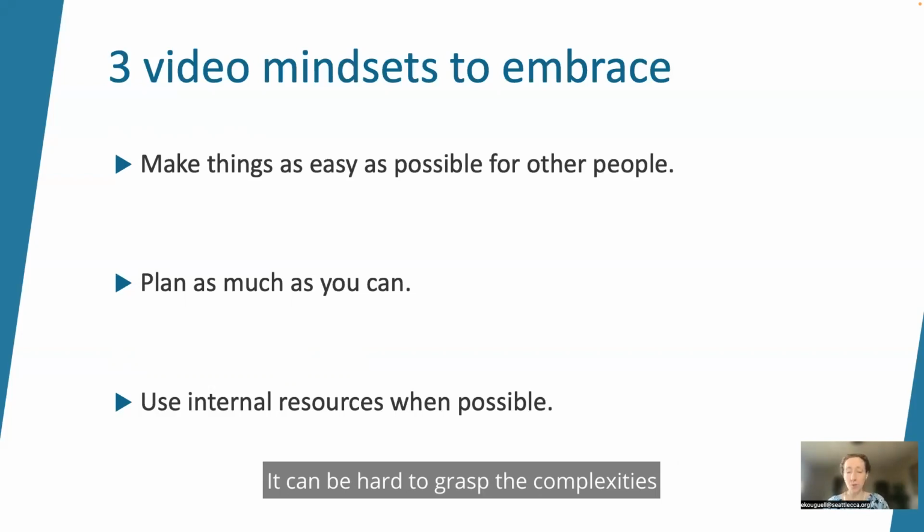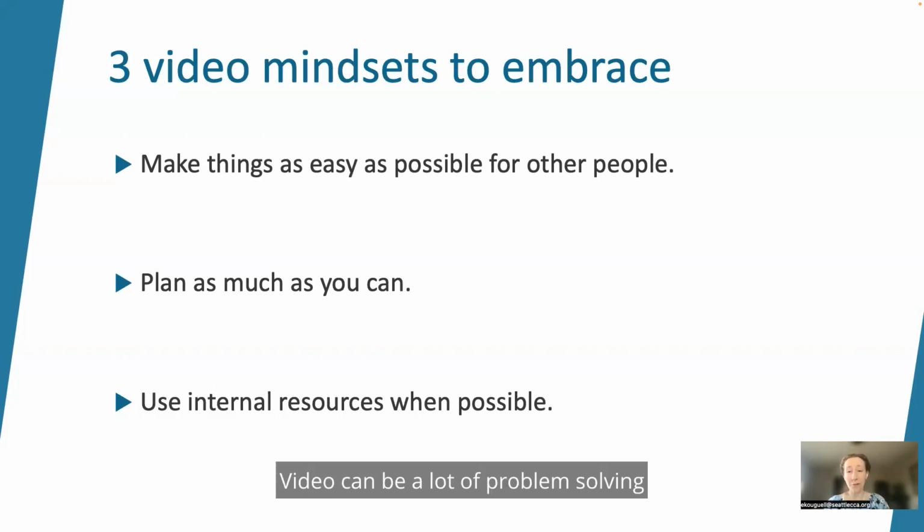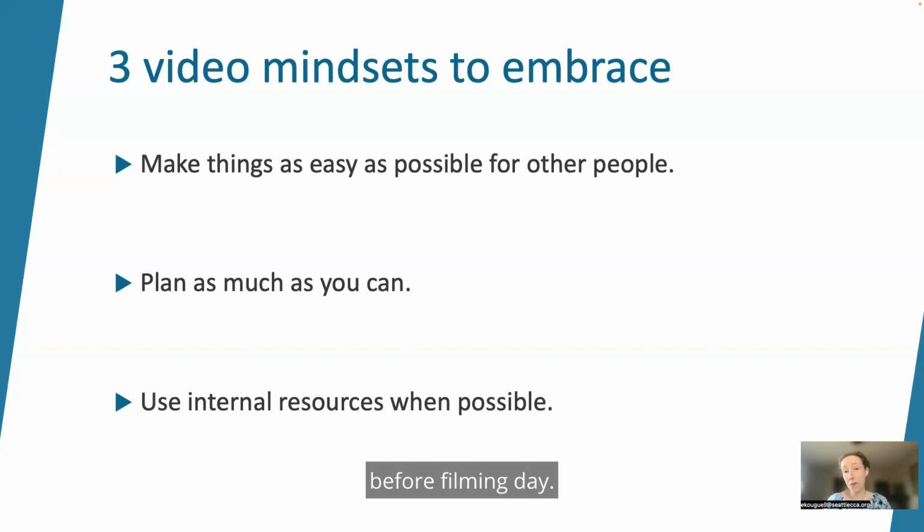It can be hard to grasp the complexities of video production, so always work to set clear expectations and over-communicate. Next, kind of similarly, plan as much as you can. Video can be a lot of problem solving and sometimes unpredictable, so do your best to foresee and eliminate as many problems as possible. This could look like building in extra time for a project, making a list of supplies you'll need for filming before filming day.